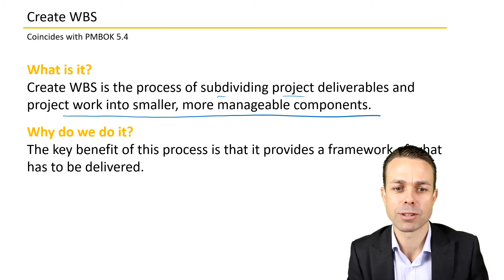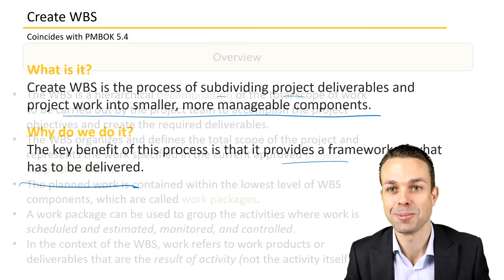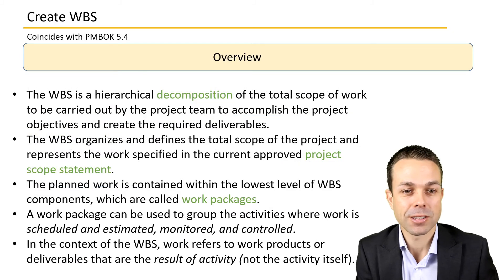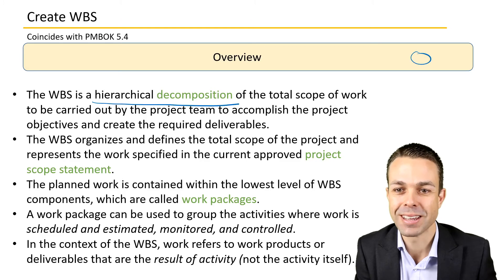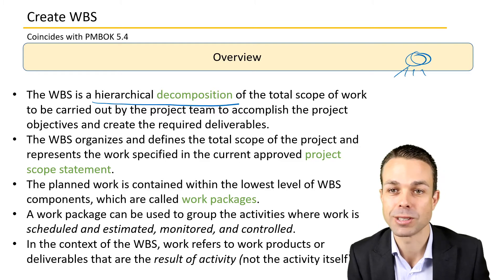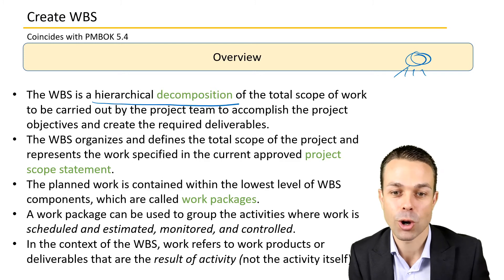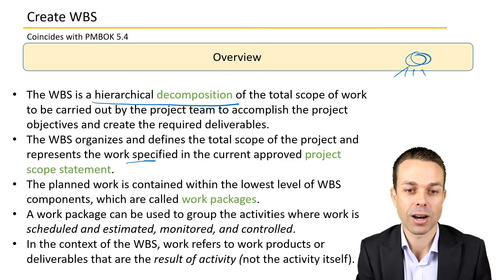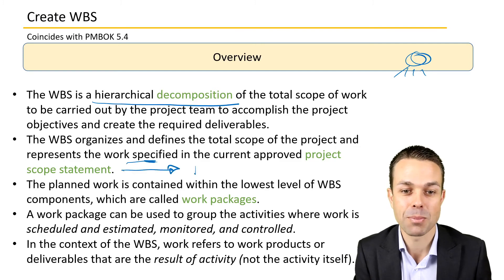The key benefit of this process is it provides a framework of what has to be delivered. The WBS is a hierarchical decomposition — we're decomposing the high-level requirements into smaller pieces of the total scope of work to be carried out by the project team to accomplish the project objectives. The Work Breakdown Structure organizes and defines the total scope of the project and represents the work specified in the current approved project scope statement, which is a baselined document.